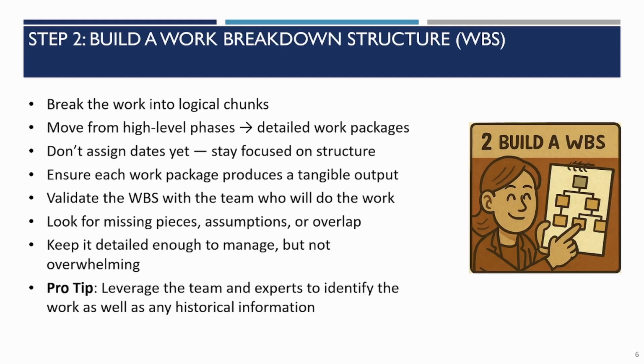So next, we build that work breakdown structure, which means breaking the work down into logical chunks, or said differently, moving from the high level phases to the more detailed work packages. So if the overall objective is build a sandwich, maybe you break that down into get the bread, put the things on the bread, and cut the bread, and then you decompose them even further. You don't want to worry about dates yet. This is really about the